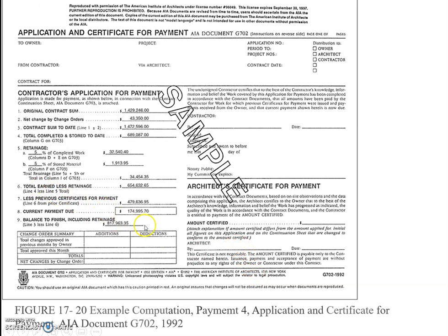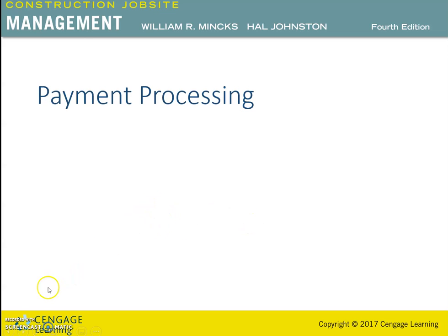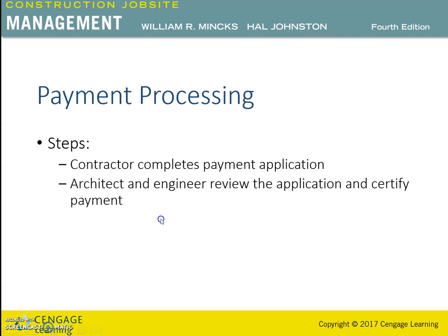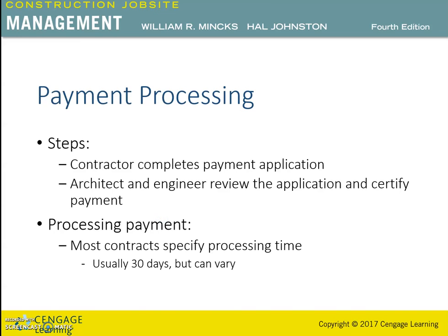Next is the payment processing. Payment processing needs certain steps. So for example, after the contractor completes the application for payment, the architect and engineer review the application and certify the payment request if correct.